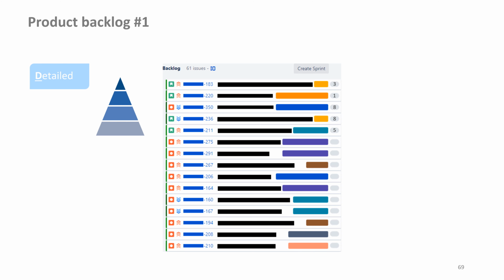If the product owner puts a sequence in the product backlog, it is known what value a user story brings. What is unknown is what must be invested to achieve this value. The product owner is still missing important information.